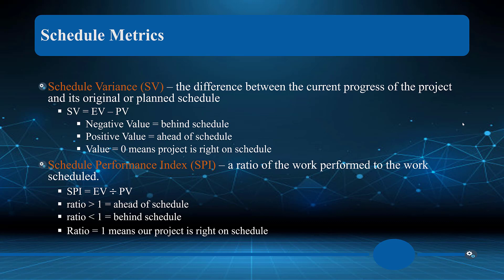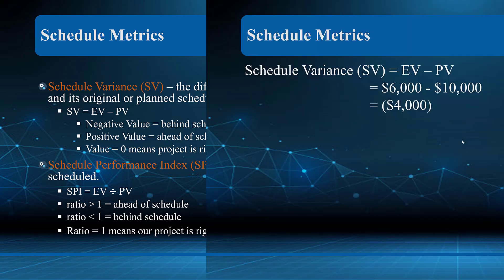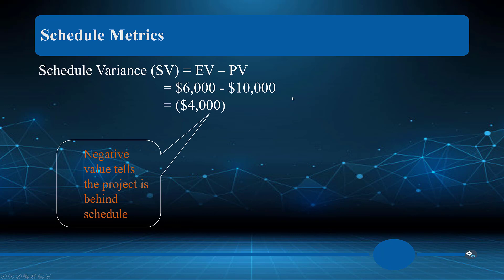Schedule variance is the difference between the current progress of the project and its original or planned schedule. It's EV minus planned value: a negative means we're behind schedule, a positive means we're ahead, and zero means we're right on schedule. We can use that index to assess where we'll end up if we continue on that trajectory.